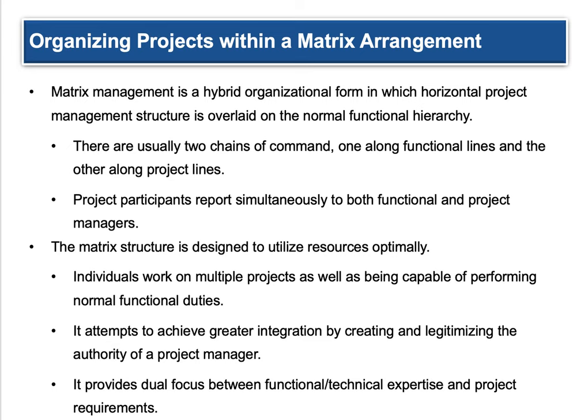Organizing projects with a matrix arrangement: matrix management is a hybrid organizational form in which a horizontal project management structure is overlaid on the normal functional hierarchy. There are two chains of command — along functional lines and along project lines — so you'll see cross responsibilities. A lot of people see it as "I've got two bosses now," which can be a negative or actually pretty awesome. Project participants report simultaneously to both the functional and project managers — that's the two-boss part. The matrix structure is designed to utilize resources optimally, focusing on using time and money wisely.